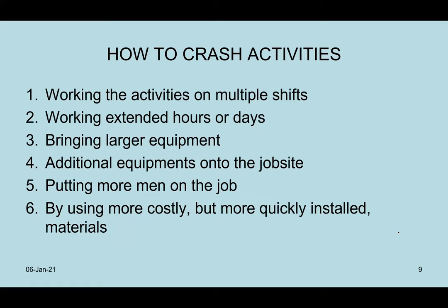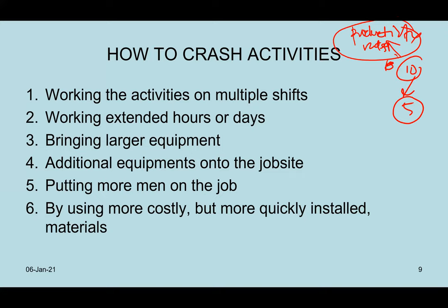Okay, how to crash activities? How to reduce the activity duration? Not just simply change from 10 days to 5 days in your Microsoft Project. No, that is not the concept. Remember, we get the duration of an activity based on productivity rate. It is the one that we calculate. So when you want to reduce that, it has to be achieved through calculation as well. You do not simply reduce to whatever duration you want. Well, for the sake of seeing the impact, yes, but it must be in a controlled situation.